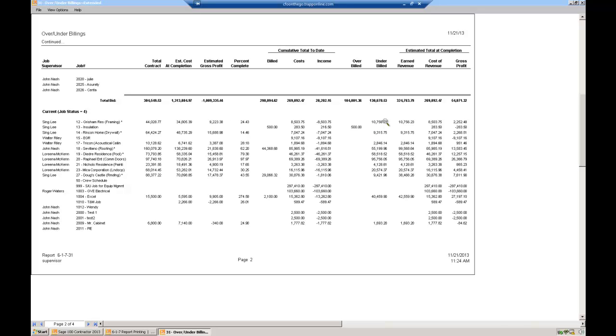Anyway, real simple. It can be done in Excel. You just have to update your total cost to date and your billings each month, and then update your forecast at completion. But what's happening now? This month you show an $8,500 loss, and you know what happens next month, right? You bill $10,000, don't have any cost. Now you have a $10,000 gain the next month.